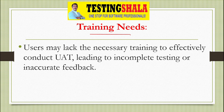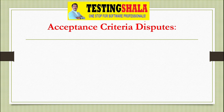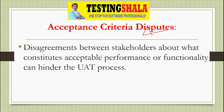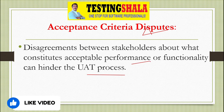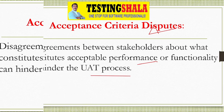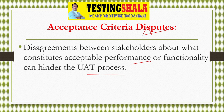The final challenge is acceptance criteria. If the acceptance criteria is not agreed upon, that becomes a big challenge. Whenever we start UAT, we must clearly define the entry and exit criteria. Failing to define these leads to disputes during functional as well as performance testing. It is always advisable to define criteria well in advance and discuss with all stakeholders to get a buy-in so that everyone is on the same page. These are the key challenges we normally face when performing user acceptance testing.